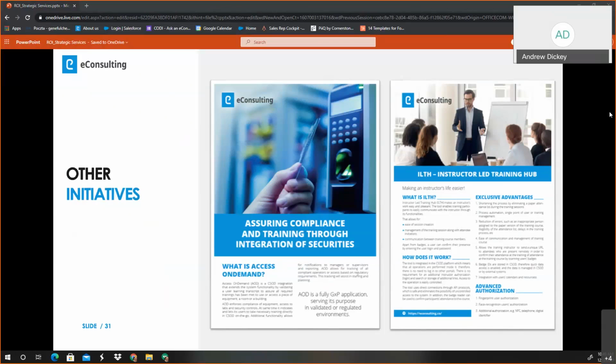So the benchmarking, the plan phase, is about a month to get it done. Then you get into the do phase, and that's about a 4 to 5 month process. That's when we're actually doing the heads down configuration. And then the check is about a 6 to 8 week phase, and the act is a life cycle. I mean, that's just continuously going on, back full cycle. So you're looking at a full life cycle of your contract. Actually, if you have a 3-year, 5-year contract with Cornerstone, we're going to be engaged with you the full life cycle of your contract.